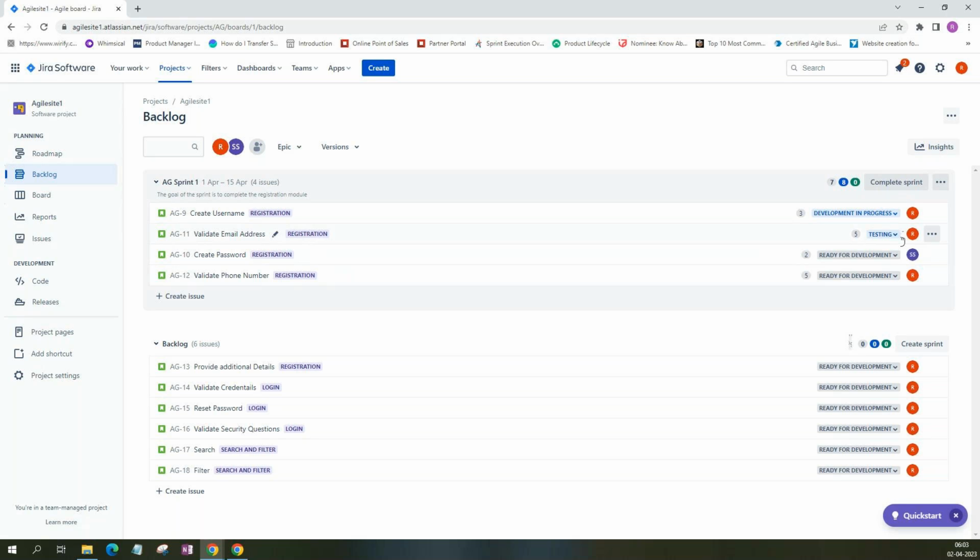In your case, what you told is, if there is more development, because in the agile world they always ask, okay, can we do it now? If the developer says, okay, I can add that feature as well in this sprint, it won't take much time. Then create one more story and track it as a different story. In between the sprint, you are not allowed to take something like that, right? But in case there is something that has to be done, you can always create an issue.